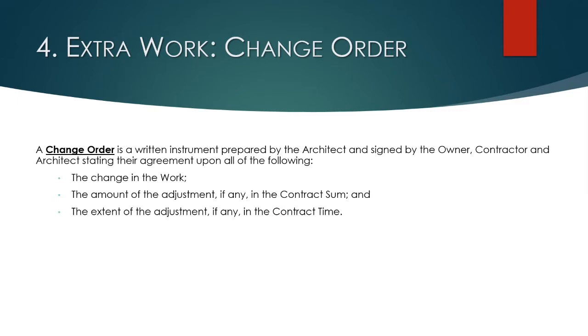The change order should spell out the change in the work, the amount of the adjustment in the contract sum, and, to the extent you're looking as the prime contractor for additional time, that as well. Again, to the extent you can extricate any delay claim from your subcontract, we would advocate that they get more time but not more money, with a no damages for delay provision.